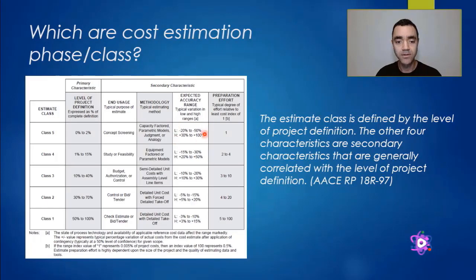The amount of money expended can vary from minus 50% of the cost estimation up to 100% of the cost estimation.